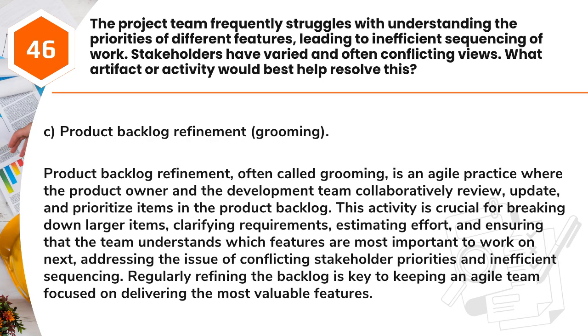Answer: C. Product backlog refinement, grooming. Product backlog refinement, often called grooming, is an agile practice where the product owner and the development team collaboratively review, update, and prioritize items in the product backlog. This activity is crucial for breaking down larger items, clarifying requirements, estimating effort, and ensuring that the team understands which features are most important to work on next, addressing the issue of conflicting stakeholder priorities and inefficient sequencing. Regularly refining the backlog is key to keeping an agile team focused on delivering the most valuable features.